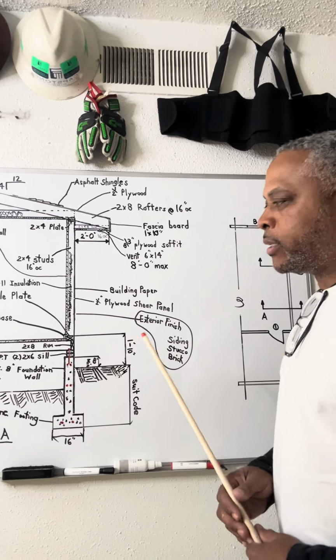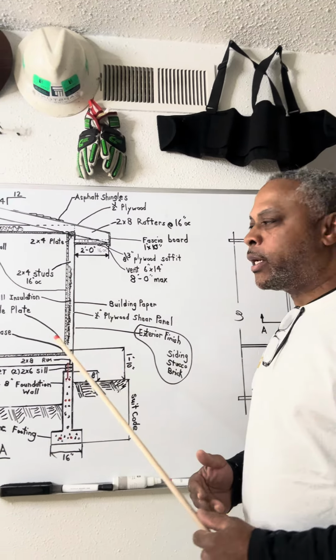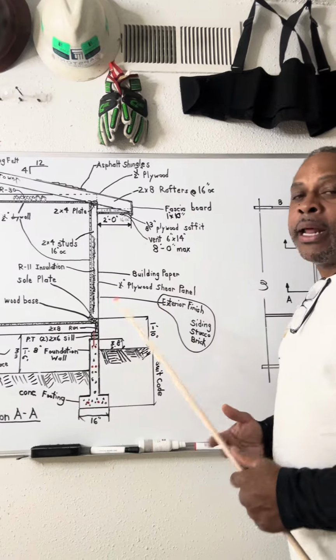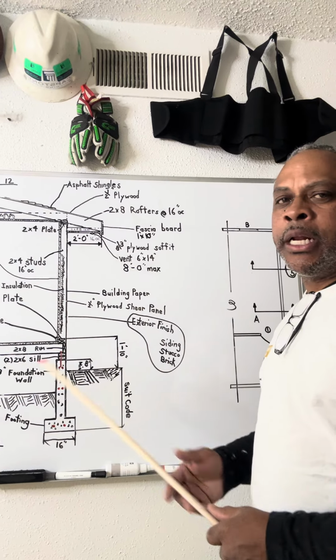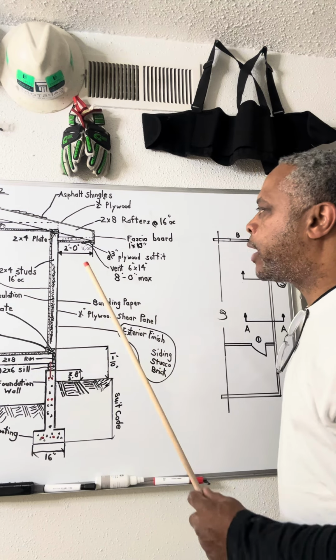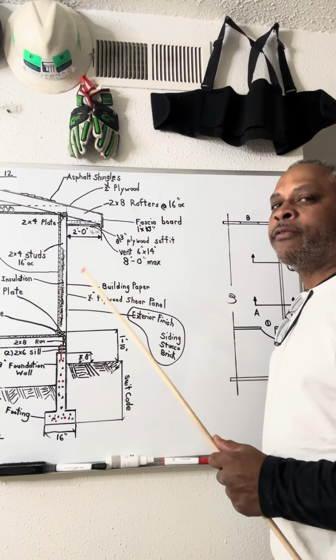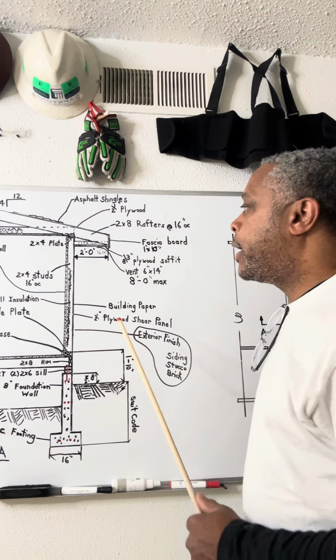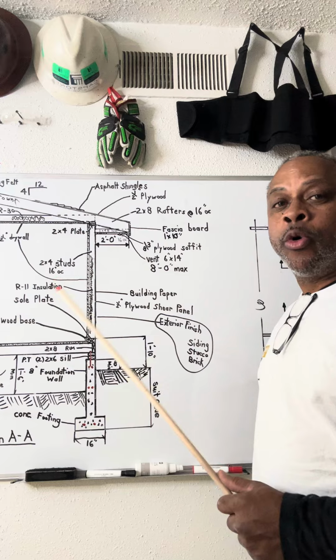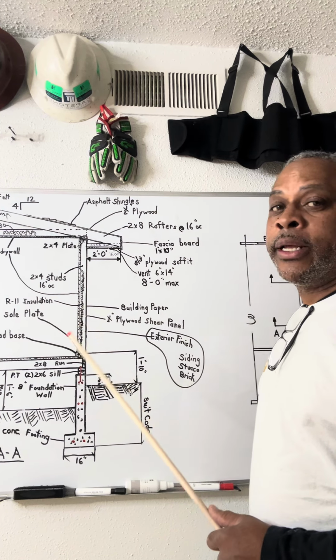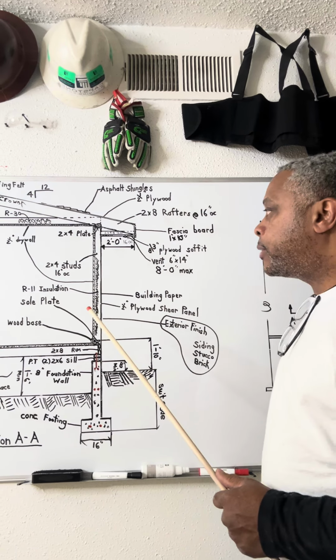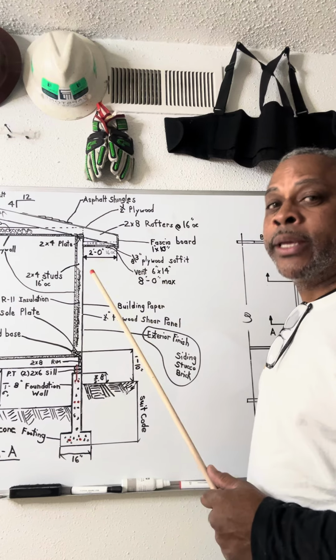The contractor buys it. So they make a crew of guys that is maybe not licensed, but there's about 10 or 15 of them. They go on big apartment complexes and frame. They have to buy their own nails. So they have to factor that into the price. You should too. Also dealing with engineering, like your straps, your hold downs and all that, that's also factored in. So make sure that you account for those things.